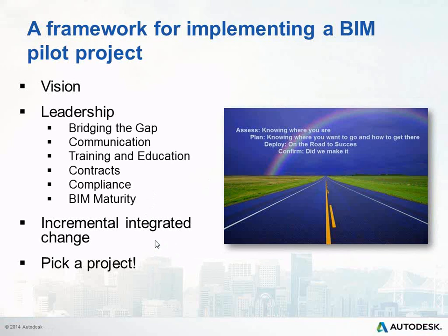The positive benefits or bottlenecks to each stakeholder in the process should be documented for further evaluation at the completion of the project. Firms want to find a BIM project they can complete — the faster and better they complete them, the higher return they'll get. Just like moving from the drawing board to 2D CAD, moving to BIM may initially lead to some drop in productivity while you're mastering the system. Generally, if you're truly focused on working with BIM, you're looking at probably anywhere from three to five projects before you regain all that productivity. It's recommended that the initial project team not work on traditional 2D CAD and BIM projects simultaneously, as this could be counterproductive to learning the new system.